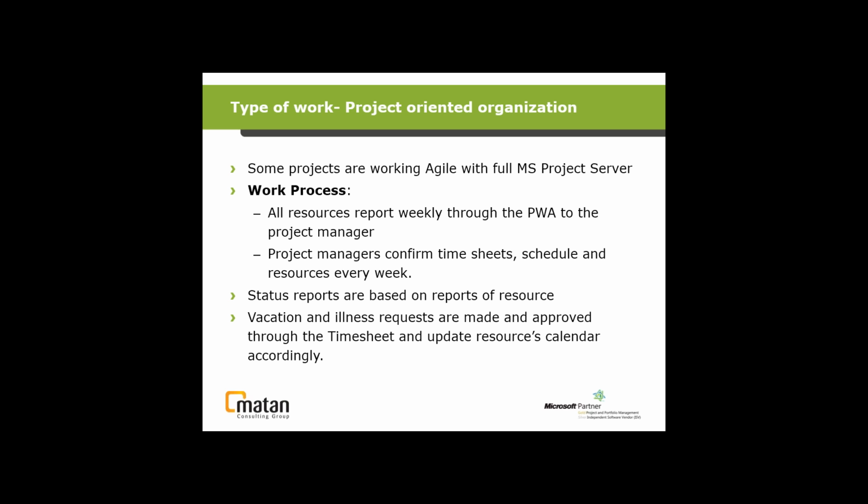So actually, out of the 4 project managers, 3 of them are working with Agile methodologies, and they're also working with Project Server. They're managing all of the work and all of the sprints within project files. So all resources use Project Server to report their work, what they're working on, according to the user stories, and the details break out from the user stories. And then they use timesheets.